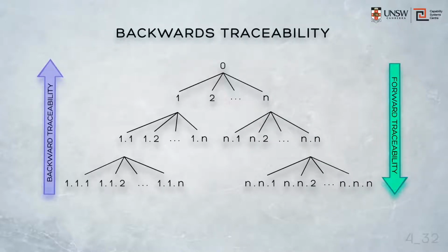Backwards traceability ensures that additional requirements that haven't been formally endorsed by the customer haven't crept in. We call that requirements creep. Any aspect of the system that therefore can't be traced back to a high-level requirement is likely to represent unnecessary work for which the customer is probably paying a premium but hasn't authorised. We call those requirements orphan requirements, and an orphan requirement is out of scope.